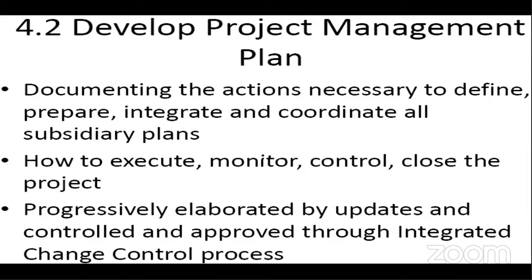So if you look at this very well, you find out that the project charter focuses more on the initiation, and then gives us the go-ahead to go to planning. But the planning gives us the go-ahead to execute, to monitor, to control, and to close out the project. Okay, so the project management plan is progressively elaborated by updates, and controlled and approved through the integrated change control process. The project management plan is not rigid. The project management plan is flexible.